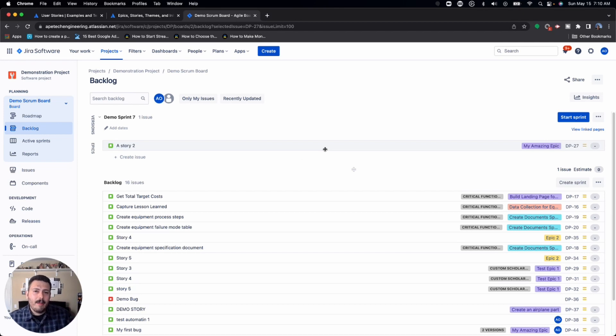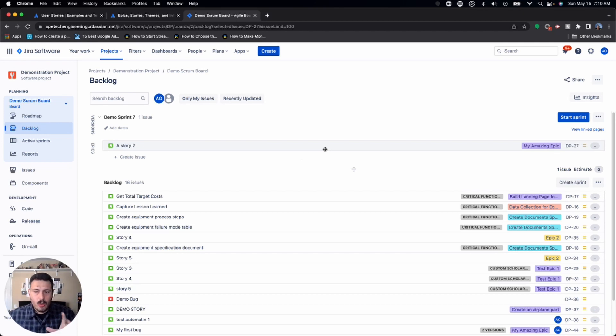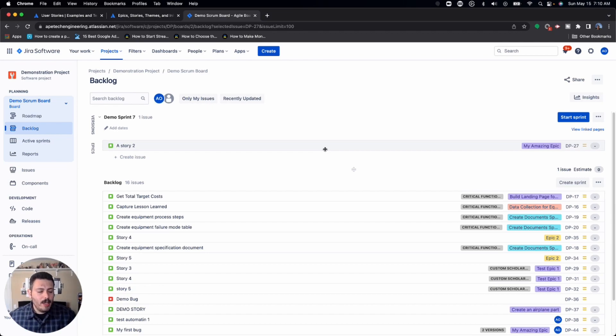And in all the years that I've been doing agile, I usually do the story pointing when you're planning the sprint. And the reason I do this is because you don't want to fall into the trick of having your scrum master or your product owner or somebody that's not the actual person that's going to be working on the issue do the story point. You can't have your developer receive a story that already comes with the value in it.